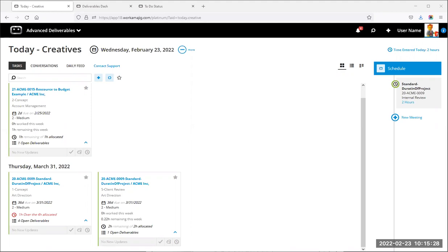Move on to here. We got Kim has a question. Is it possible to turn on this feature for a single project rather than all projects for testing purposes while we determine if the new deliverable feature will work for us? Kim, unfortunately, it's kind of an all or nothing type of setup. There are some ways to tweak things to say, okay, this security group can't view deliverables, they can't view to-dos. So there are some security rights to hold things back from certain groups, but I think you're just going to cause more headache, especially if you try to go back and make it visible again, that might be a little challenging. If you do have a test instance with us, I would suggest trying it there.